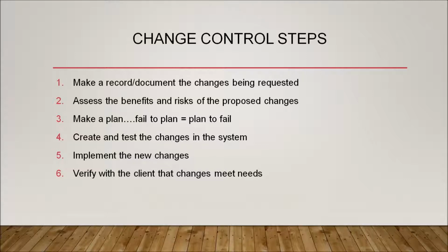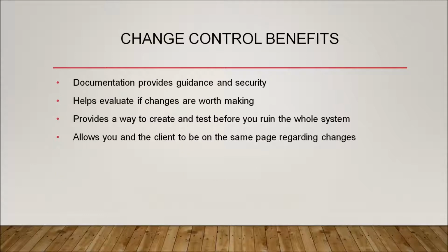So why is documentation important? Well, documentation provides guidance for you throughout the process. It also provides security. Security, you ask? Well, yes, if you change the background of this to red and the client comes to you and says, hey, I told you that was purple, having documented that provides you that security that you're doing things the right way.